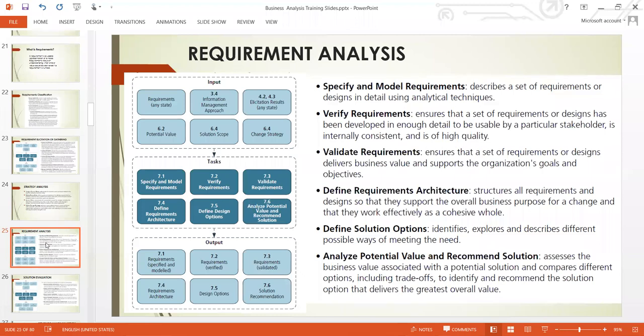As we move on, we are going to look at the way we design the architecture, and then we look at the requirements. That's when we start breaking it down from high level requirements, that is the epic list, to user stories. You start breaking it down. And then for every user story, you design the acceptance criteria, what the requirement needs to meet before it can be accepted. So all these things are part of the design.